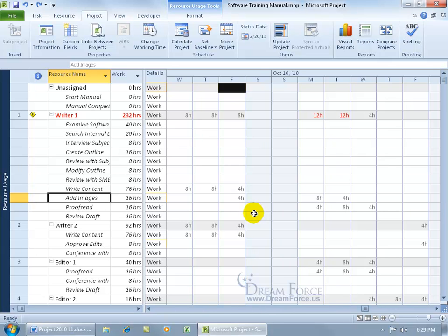Even though you get the clear leveling feature, I mean, if you have the undo button available, that works, but if you click save, as you recall, the undo button's no longer available. So you do get the option to clear the leveling after you level it without using the undo feature, but keep in mind, if you level more than one resource, Project will only give you the option to clear the most recent level, okay? So that's why it's probably a good idea to save a copy of it. In any case, I'm not going to save a copy, but I recommend that you do, okay?